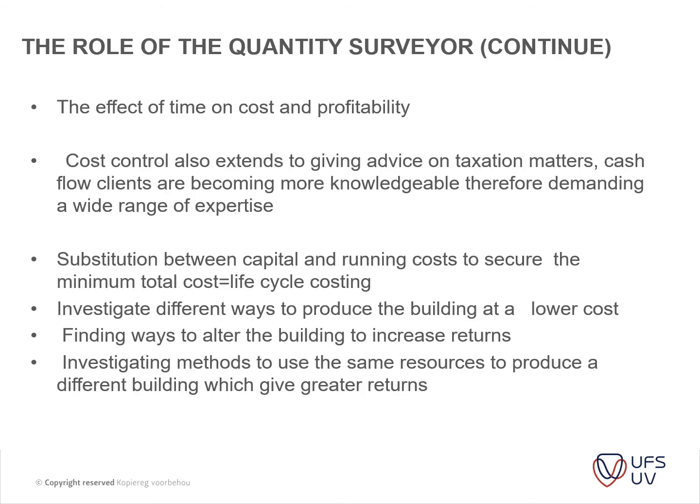Okay, so this brings us to the effect of time and cost on the profitability. The QS should be able to understand that the longer the project takes to develop, the more cost or the less profit the client might have at the end of the project. So the cost controls also extend to giving advice on taxation matters. Cash flow of clients are becoming more knowledgeable, therefore demanding a wide range of expertise.